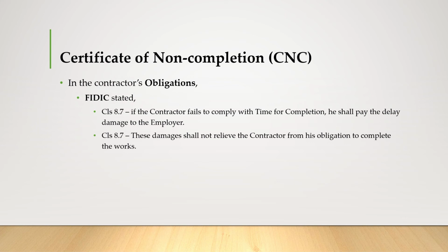So in FIDIC, the contractor obligation is stated in clause 8.7. If the contractor fails to comply with the time of completion, he shall pay the delay damages to the employer. Also in clause 8.7, these damages shall not relieve the contractor from his obligation to complete the works.